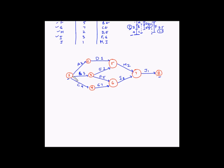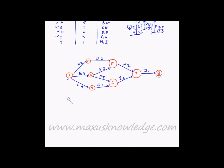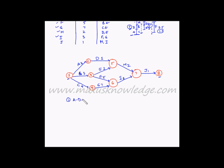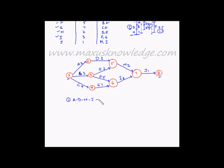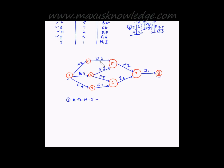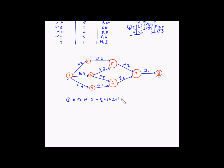Let's figure out all paths and their durations. The first path is A-D-H-J, with durations 2 plus 1 plus 2 plus 1, which equals 6 days.